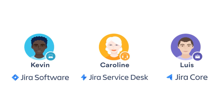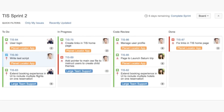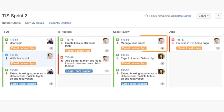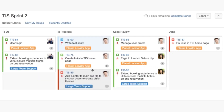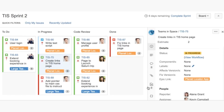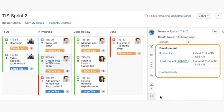Here are some typical users for each Jira product. Hi, my name's Kevin. I'm a developer, and my team's creating a new mobile app for locating planets. We use Scrum for our software development, and we manage all of our work on a board. This contains everything we've committed to finishing within this sprint. I've already fixed one bug, and now I'm working on another one. I also have a story that I've implemented that's in code review, and now I'm ready to write the test script, so I'll grab this task and move it to in progress. One of the best things about Jira Software for developers like me is that I can create branches and monitor pull requests and build statuses right from the Jira ticket.